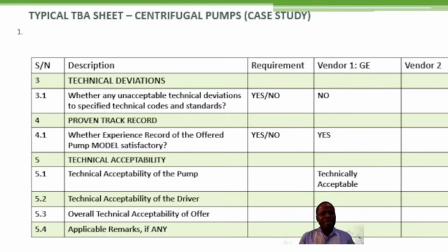So now, after these listed conditions, after these listed requirements, either as stated as per the applicable standards or codes governing the designs of the equipment you are intending to purchase, or your own project specification or project requirement, then you now check, now this vendor one, to what percentage has it met my conditions? 75%, 80%, 90%.